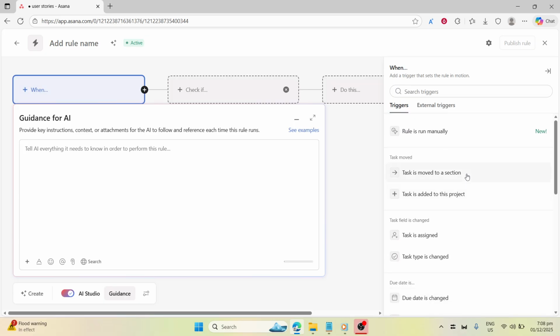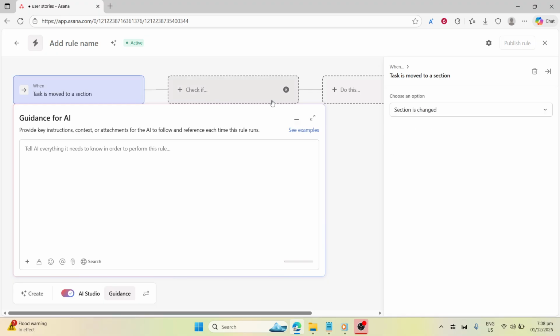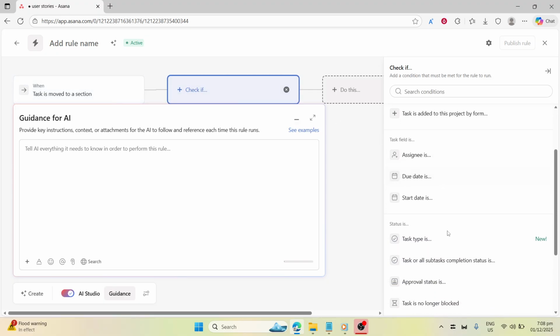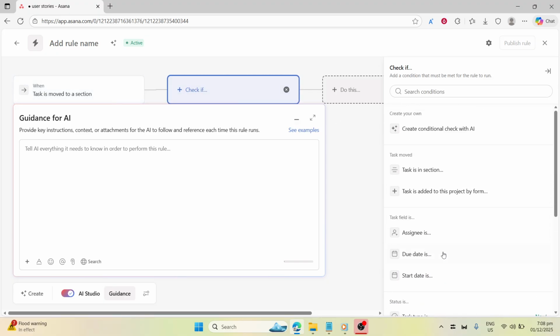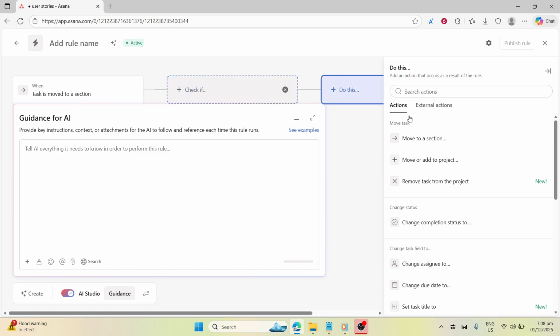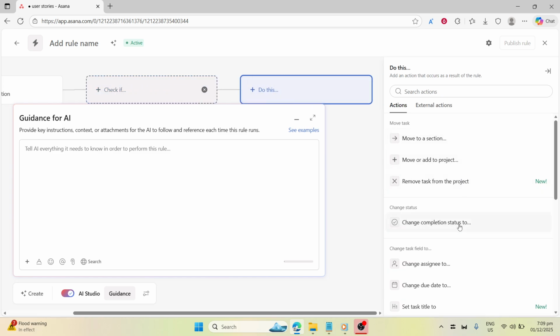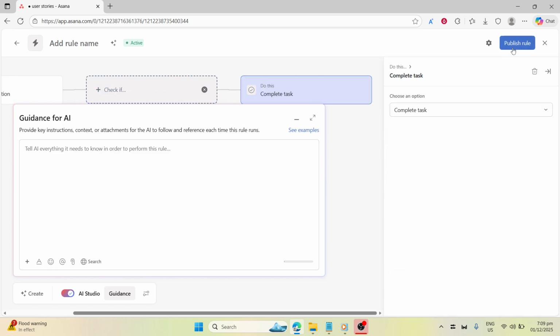Before you mark a story as done, confirm it follows the template, the acceptance criteria are clear, all subtasks are complete, and a stakeholder has reviewed the output. Follow this flow, iterate as you learn, and your user stories will stay clear, trackable, and shippable.